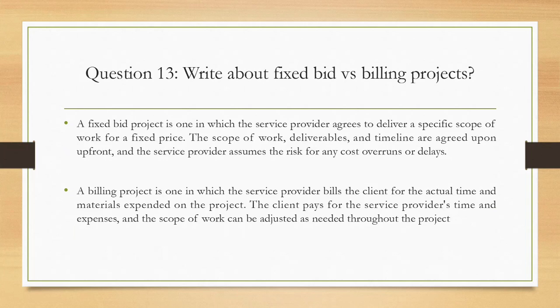Here in this case study, Mr. Anant gave us 18 months of time, right? And 1 crore of budget, right? So within 18 months and 1 crore, we need to deliver whatever project he has assigned to us. If we are not delivering, it will be a failure to our organization only. So all the budget, time, and work are going to be fixed in this fixed bid project.